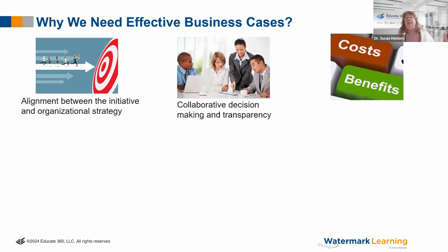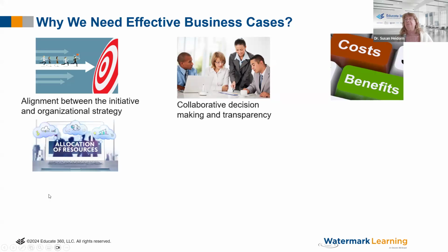Somebody has to support it, whether that's looking at upgrades or licensing fees, user fees, even just monitoring it off and on. It's going to cost you money because you're having headcount go against that, right? So making sure that your costs include those support and operational costs as we move on, to get a really strong understanding of what this whole initiative would cost you over time.